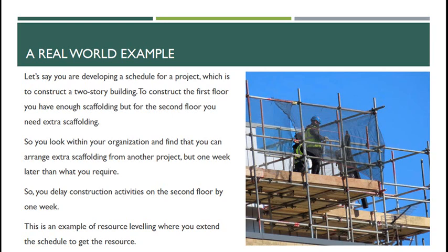One option is you go and find a subcontractor perhaps, or a leasing company, and you lease additional scaffolding, but you probably need additional scaffolders as well, so you may outsource it. Again, that has a cost implication on the project. Or the alternative is to delay construction activities on the second floor by a week. You could possibly get those construction workers working elsewhere during that week while you wait for that scaffolding to become available, and that way you try to be as efficient as possible.